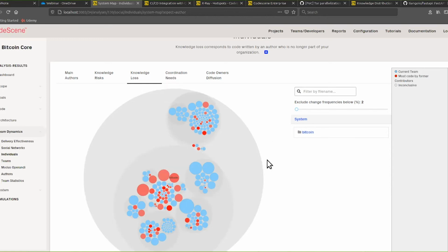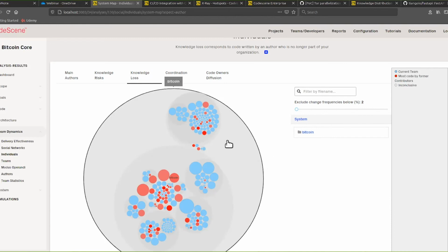So those are really parts you can plan for. For example, if you want to plan a new feature or a change, then you can look at this graph and say, okay, we want to make changes in that part of the code. We have no knowledge there, so maybe we should spend some more time on this feature. First part is to dig ourselves into this piece of code to find out what it does, how complex it is, just to get a feeling for the code, and then in the next part we can make the changes and get the features to the market. So you don't plan by thinking that you know everything, and then afterwards say, hey, that took a very long time, that's very strange. So you can plan your project a little bit based on that.